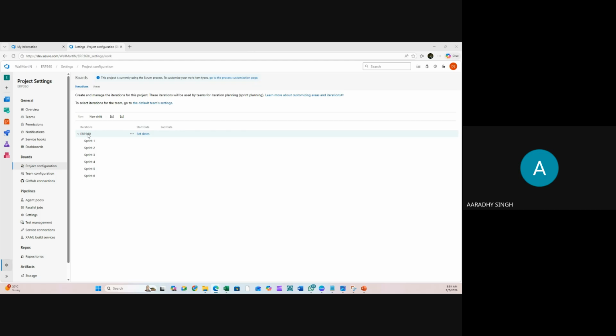For example, suppose you have a total of 6 modules available and the total duration of the project is 6 months. What you can do is divide it into small sprints, and the duration of the sprint you can go with is 1 month. Standard duration, Dipanshu or Ashish Dhar, what is the standard duration for the sprint? Around 3 weeks. Perfect. It can be 3 weeks, 4 weeks, 5 weeks also, but standard is 3 weeks. I have seen 1 week sprints also, 1 week, 2 week, 3, 4, or 5 week, but standard is 3 weeks. So 21 days will be the standard sprint duration.